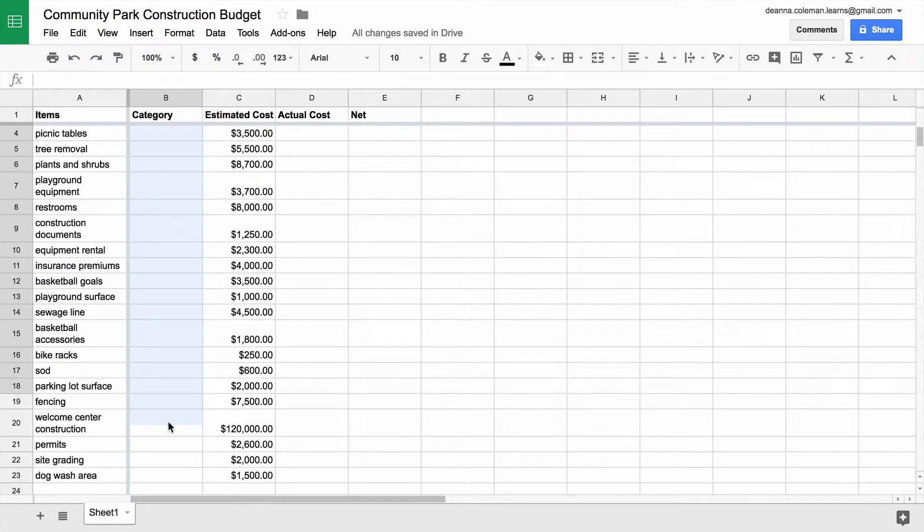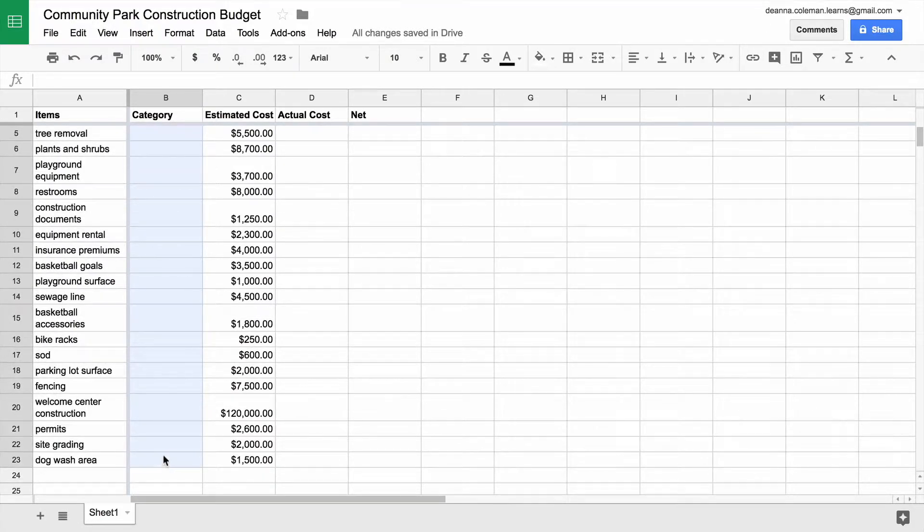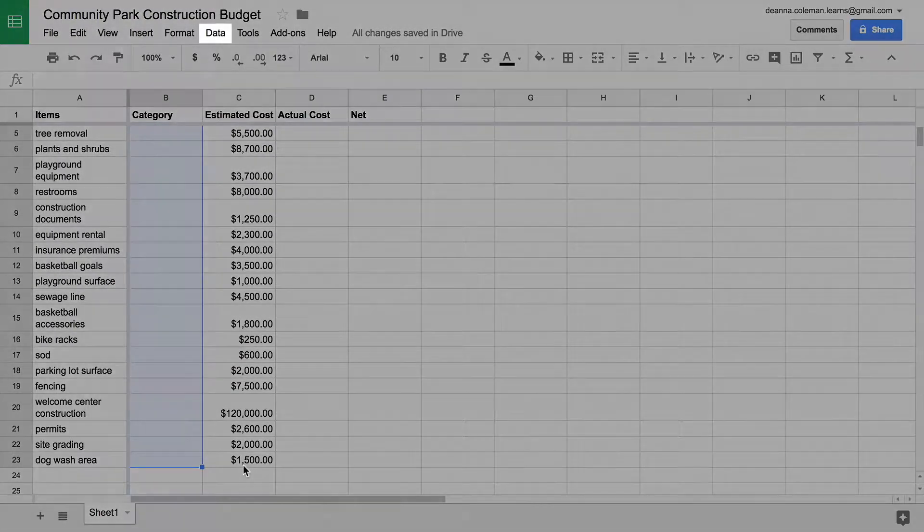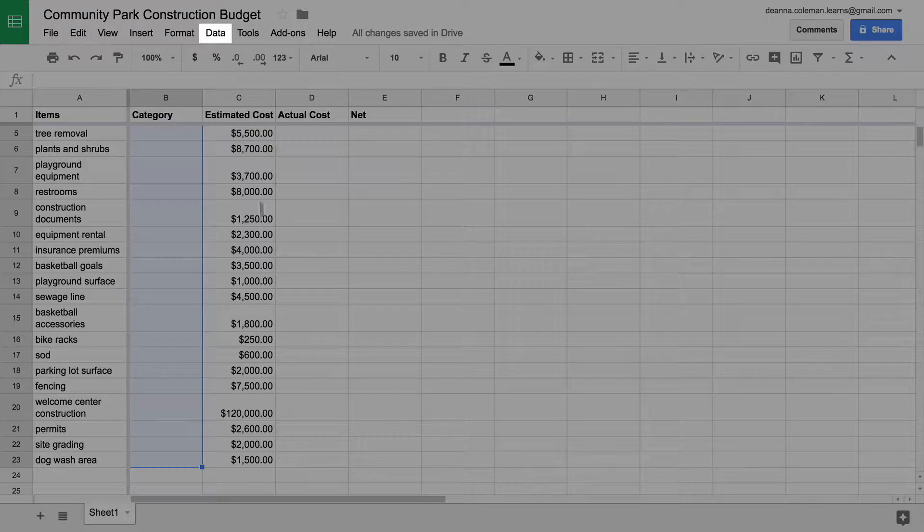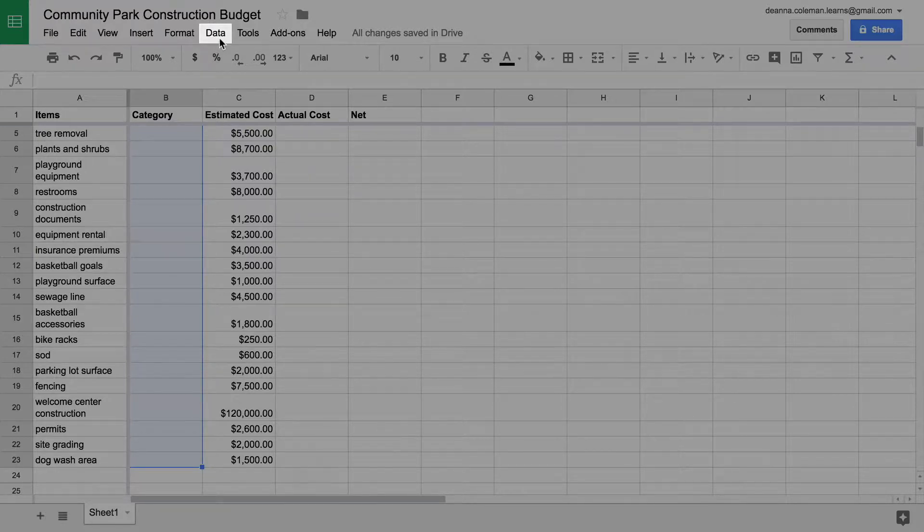Highlight the rows in the Category column down to the bottom of the line items list. From the Data menu, choose Data Validation.